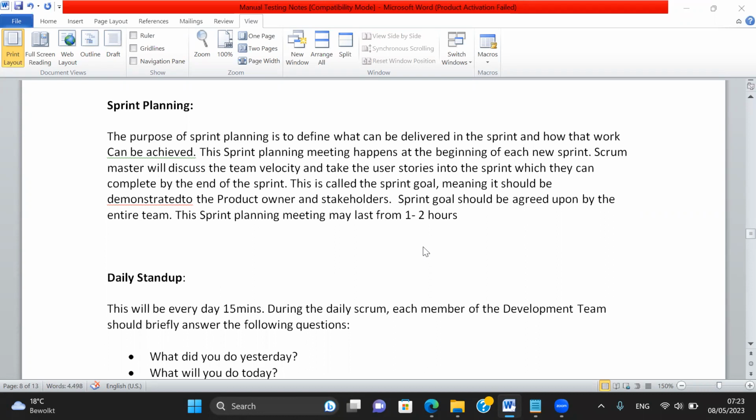Yes. Clear. So daily there will be a meeting called the daily stand-up meeting. This meeting will happen on all the 10 working days in a sprint. Okay. That is called the daily stand-up meeting. This meeting will be for 15 minutes. How many minutes? 15 minutes.